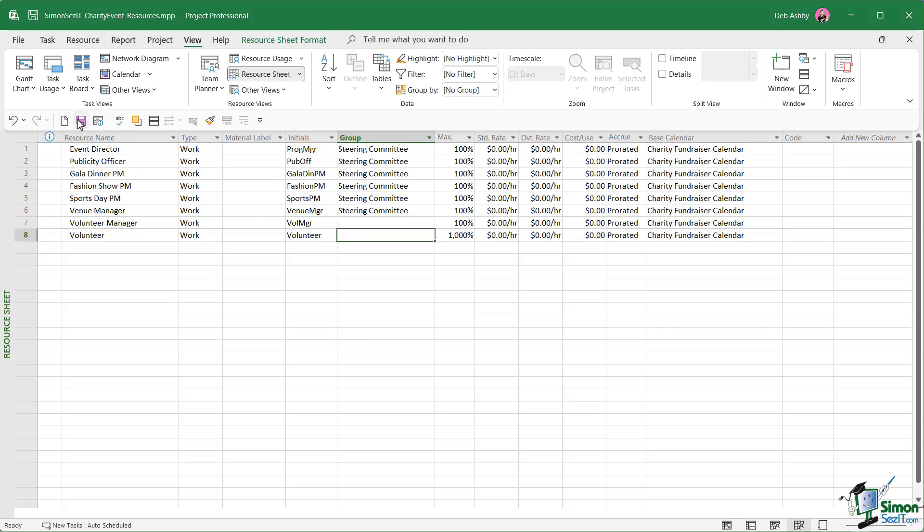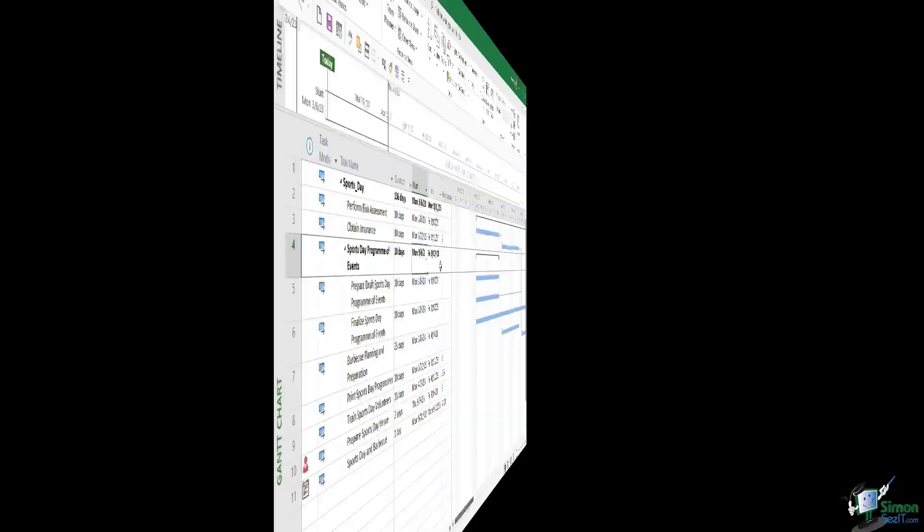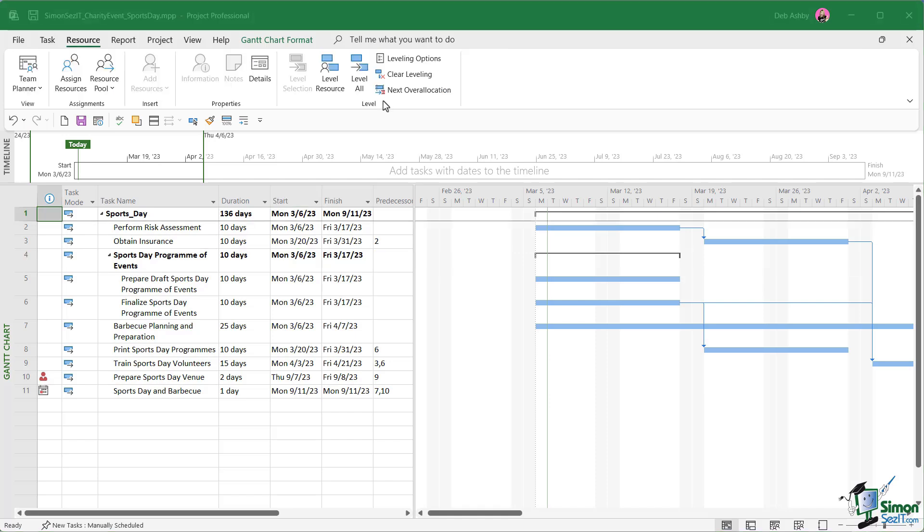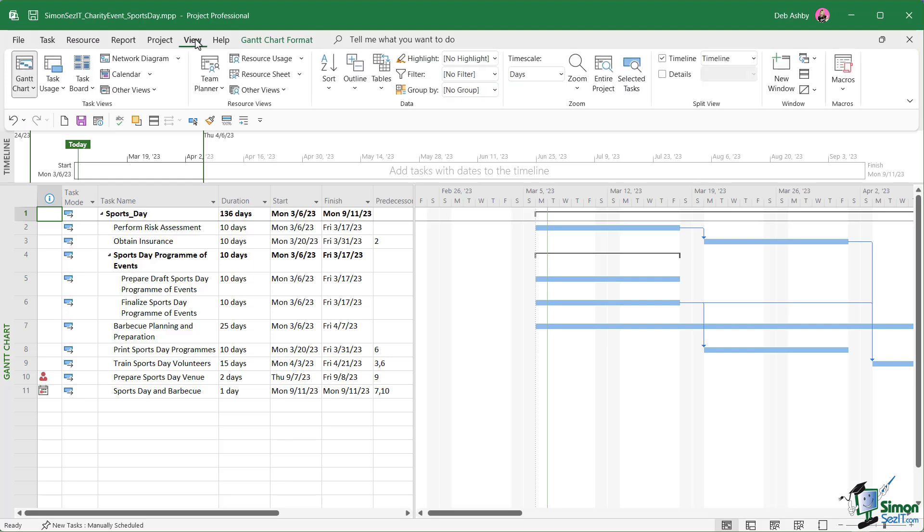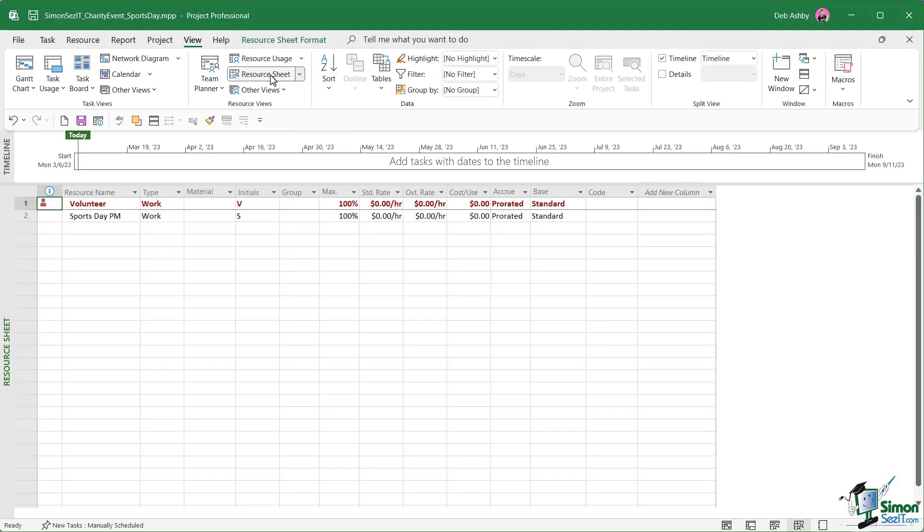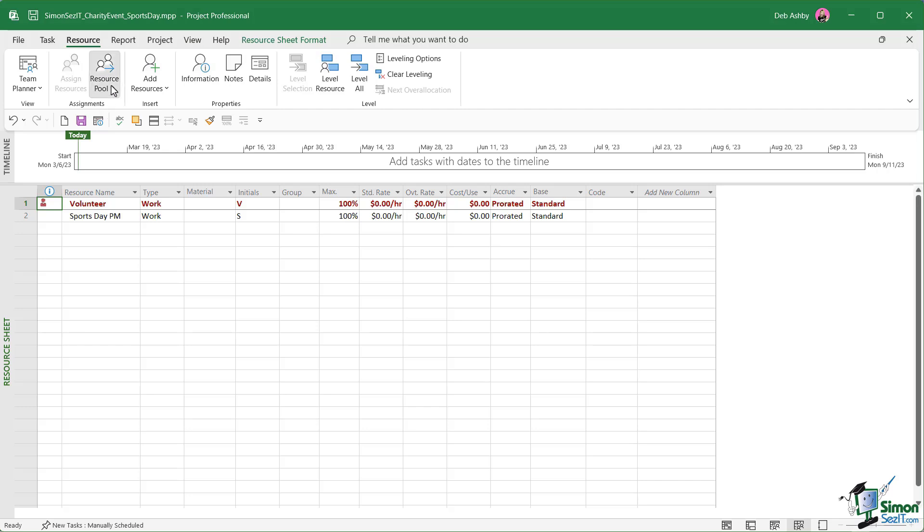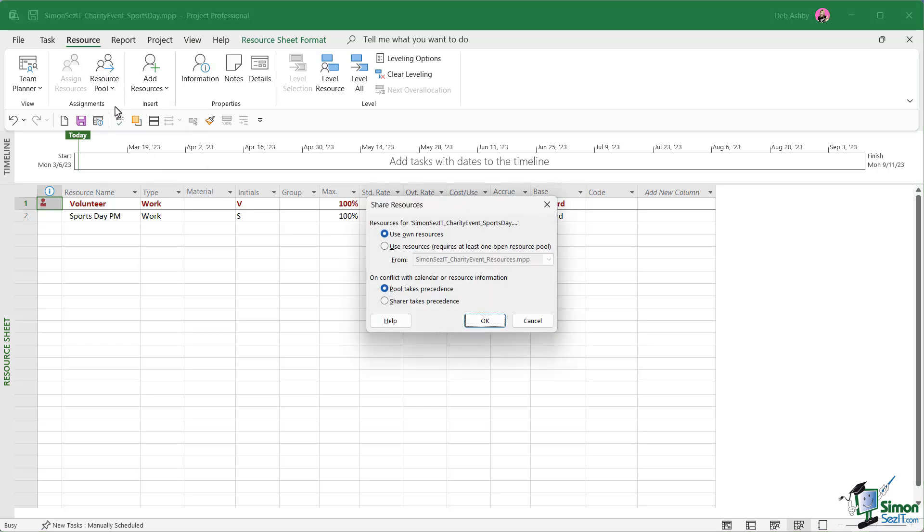Let's give this a quick save and I'm going to reopen the other file, the sports day file. What we need to do here is we need to specify that this project uses the resource pool that we just created. From here, we're going to switch across to the resource sheet. Remember, you can switch across using the icons in the bottom right hand corner in the status bar, or you can jump up to View and resource sheet is just here. Let's click on resource sheet. You can see the current resources that we have, that limited list. If we jump across to Resource and into Assignments, we have a resource pool option. Let's click share resources.